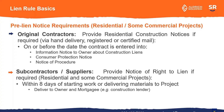If you've been working on a project for 16 days and you forgot to send your notice of right to lien, then your first eight days is actually not going to be lienable because you didn't provide the notice. That's why I tell people, if in doubt, go ahead and send it. The form required by the statute actually says on there 'this is not a lien' — it's just preserving your right to lien.